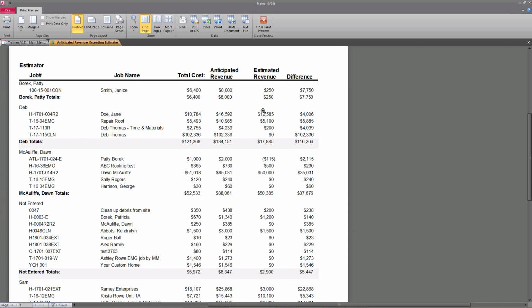So when he used his finger on his phone, he just accidentally grabbed the last one. The wrong one. Again, depending on how the information is getting inputted, you want to look at that. Okay. Correct the postings. When that gets corrected, the cost will drop, which means the expected income will drop. Perhaps again, if it falls under the estimated revenue, it comes off the report.